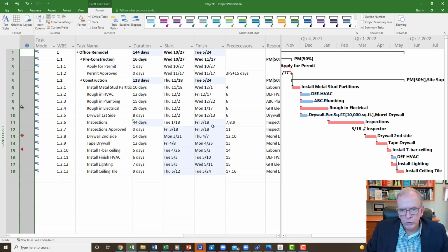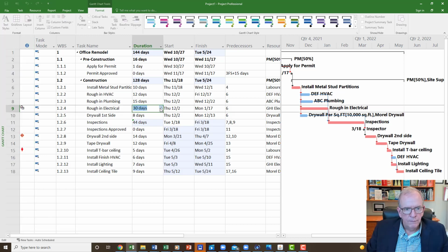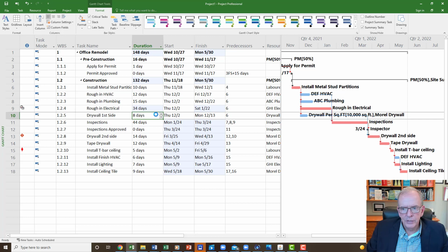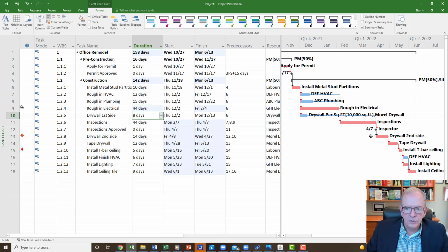So if stuff is pushing this out further and further on your project as you're going through the updating process, then you would see that flag appear that you've breached that deadline, and then it's going to start to appear to the left of your activities once it comes out of there. So that would give you a flag early on. Like if you're back here and it becomes a problem, you would see it sooner rather than later.